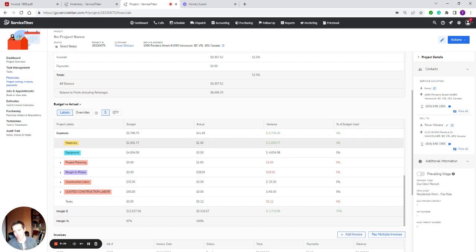Notice the other one that's in pending isn't showing up. Only $1 showing up, not 2, right? Each purchase order was for $1, and only one of them is showing up. That's the purchase order that's been received. The other one's still in pending status, so it will not be calculated.